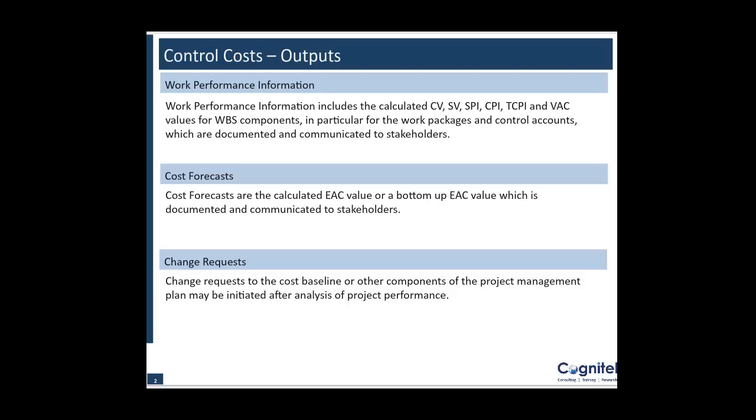It's a change request related to cost. Changes can be raised to the cost baseline or to other components of the cost management plan, and they would be fed back into the planning processes. Once the change request has been approved by the change control board, it can be fed back to the planning process. It needs to be fed back because we'll need to revise your cost management plan. It might have an impact on your other plans like schedule, scope, etc. And you will have to track this change to closure. Okay. Moving ahead.